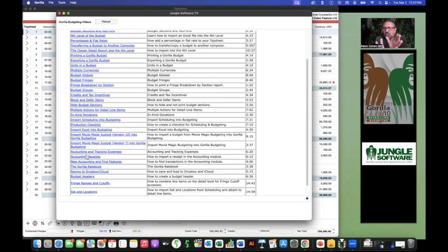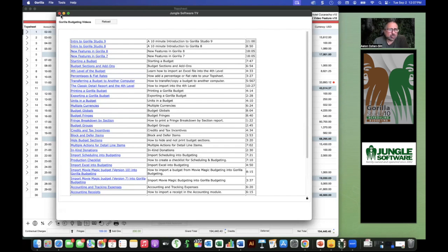And so we do have a feature here that you could literally enter, let's say you have 5,000 budgeted for XYZ, but you've paid 2,000 of it already, whether it's by payroll or whatever. You can go in there and say we've already paid 2,000 of the 5,000, and then do a budget balance report and show a report on what's paid and what's not paid. Okay, and that's in the account level. So watch these videos about how to do accounting and tracking expenses if you want to get into that level of detail. We have all that there also.